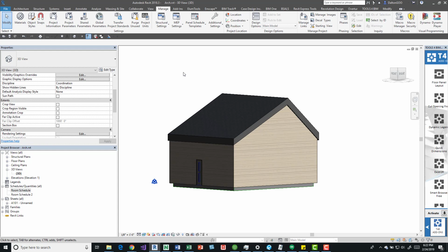So that's a cool way to give each element within Revit a user ID, because then we can connect the two later on and have an effective, efficient workflow. No single product or process is going to be the same when you're constructing a building, so we can't anticipate that. But what we can do is try to anticipate the best way that they're going to use the schedules, and then give them ID numbers that we can easily connect into Revit.